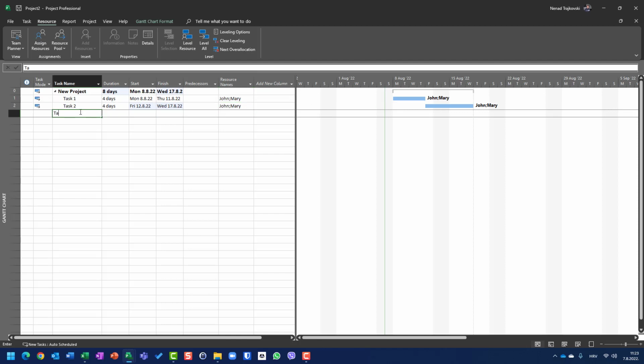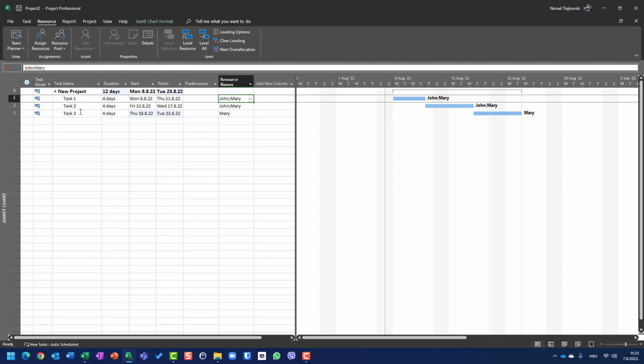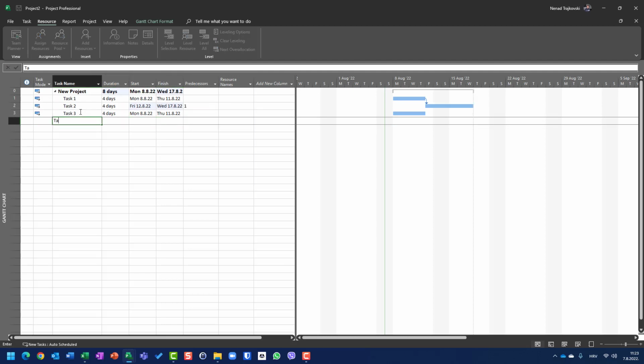Let me show you another example. Task 3. I will say 4 days and I will say just Mary. Hop, you can see. So in that case, you tell Microsoft Project, please do not allow overallocation. So let me go here and let's say task 1, task 2, task 3, task 4, 4 days.